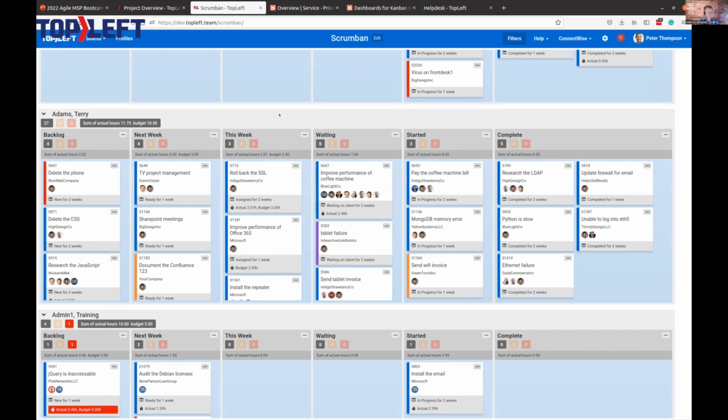So, if you somehow set it up so that there's 60 hours there, then obviously that's a big problem. You need to fix that. Also, if it's only 10 hours, then that's a big problem too. You can give more work to Terry for this week. You do the same thing for the next week, making sure there's the right amount of hours there for next week.